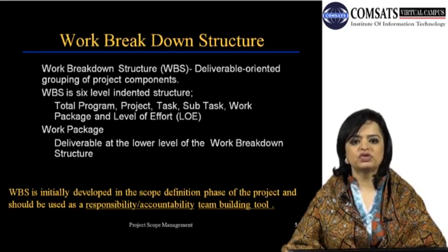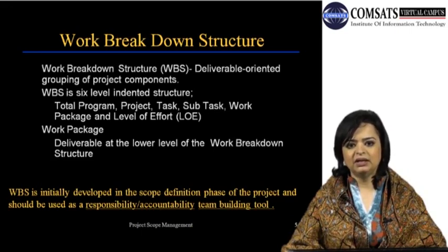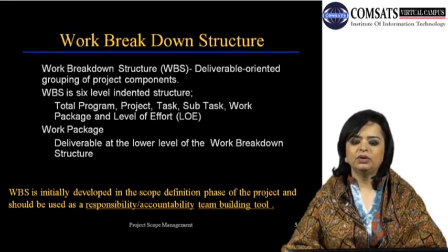If the person who is responsible for doing it, for example, for creating a web page, says it will take 5 days or a week, or it will take 7 days to do a certain task, a consultant would say maybe it can be done in 5 days. Between the discussion, you can come up with an estimated time of 6 days to do that particular task.